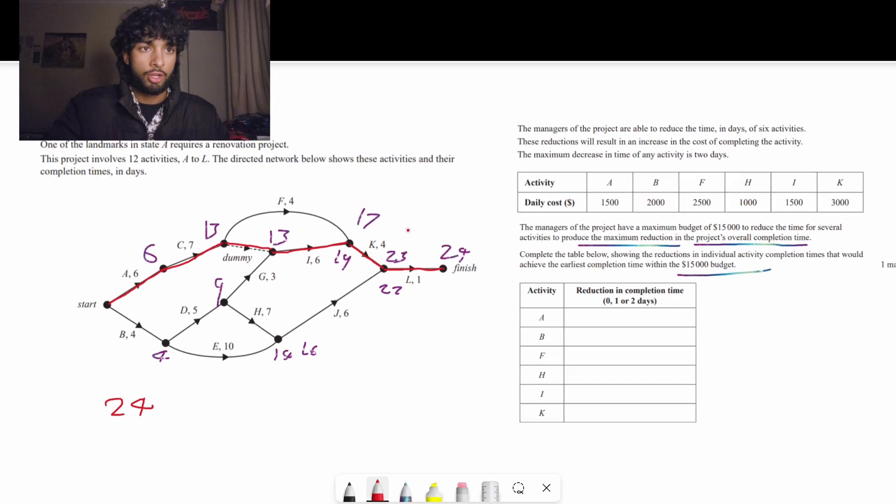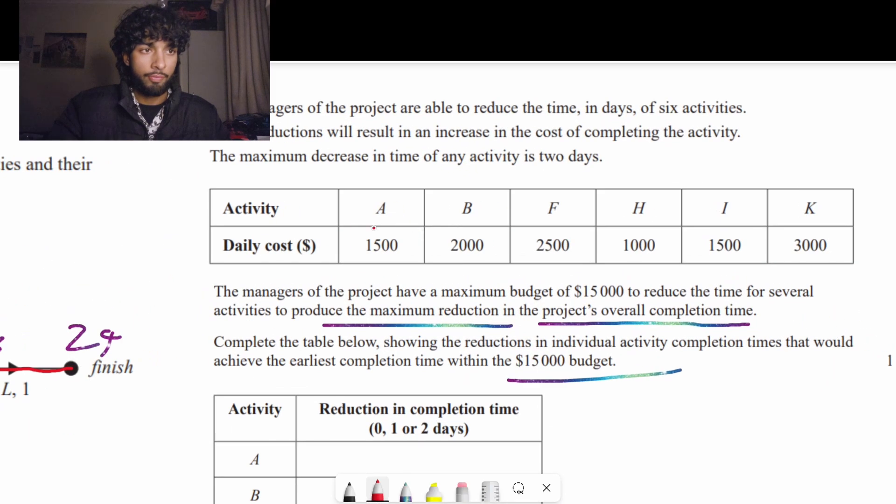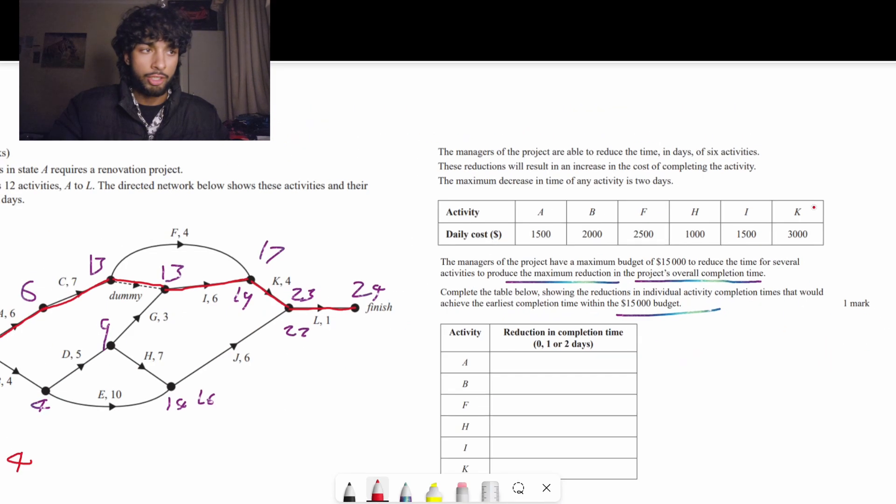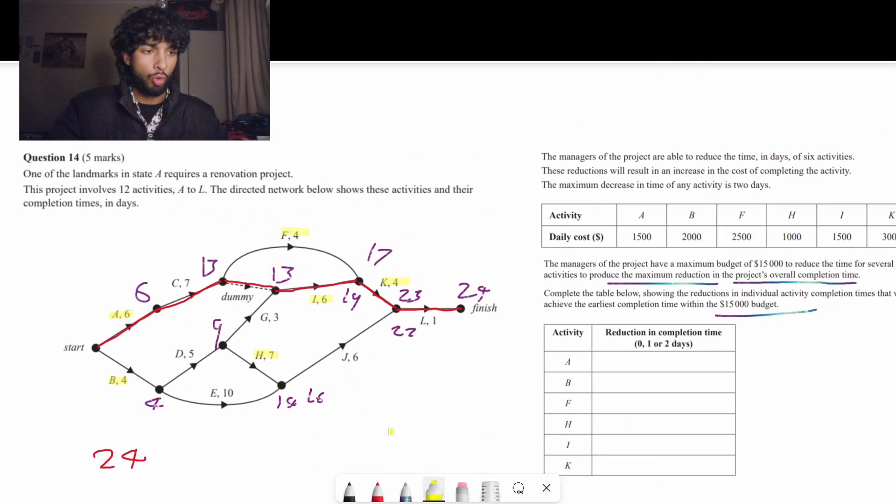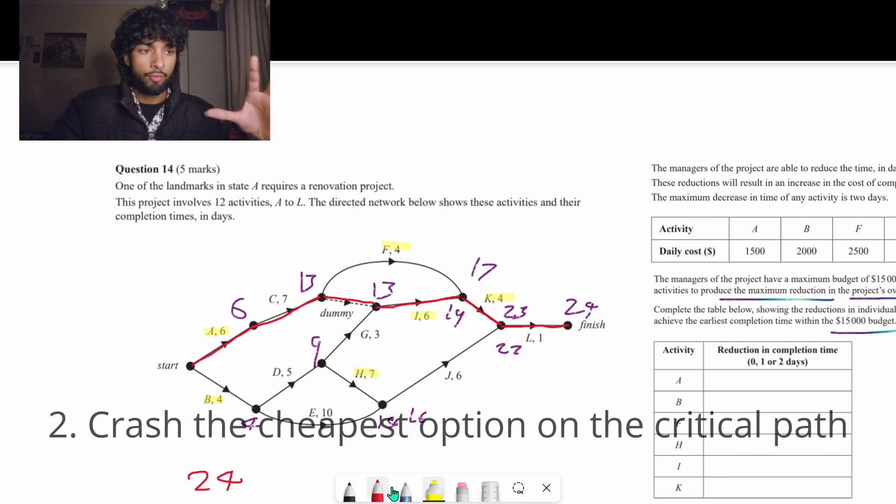Currently the overall completion time is 24 and we want to try to reduce this as much as possible. Let's have a look at the six activities a, b, f, h, i, k. In this method, we're going to first try and reduce only the necessary options and the cheapest options that are on the critical path.